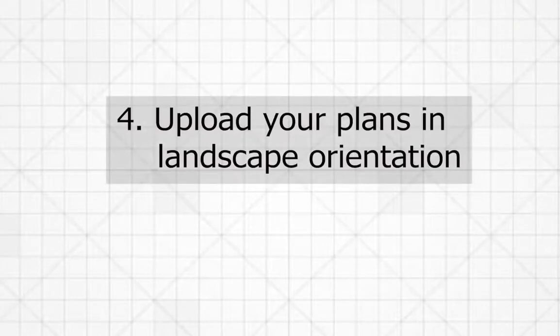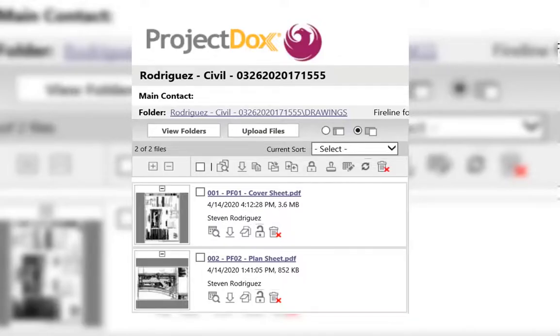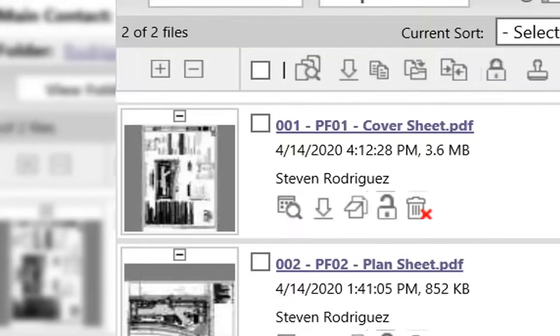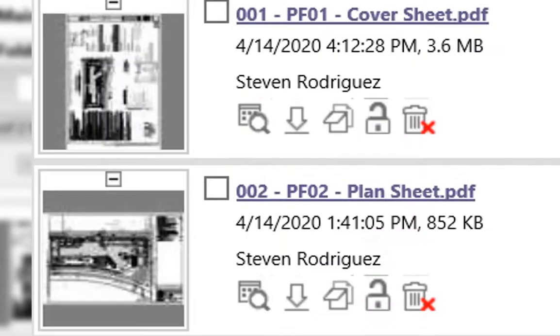Fourth, upload your plans in landscape orientation. When customers upload in portrait orientation, the reviewer will need to modify it to mark it up. The time to modify several documents delays the review completion. Always upload in landscape orientation.